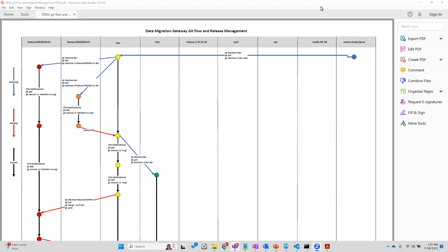Then it is given the story point. In sprint planning, it is decided what the acceptance criteria of the story will be. Okay. Then after that, what will be the story points for that. Story points is nothing but the effort. This will take 2 days, 3 days. That is different. The story points are generally like 1, 2.